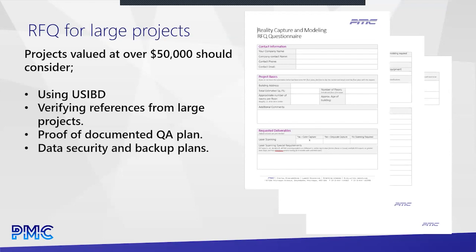Again, this is important because doing this correct represents a large cost item for us as suppliers. And it's an easy way to save money to take shortcuts here, but it puts your job at risk. And again, on smaller jobs, if it's a reputable provider, they can go out and fix it. It's not the end of the world if they lose your data. It's not good, but if you have a big job, this can be catastrophic because you can lose months.